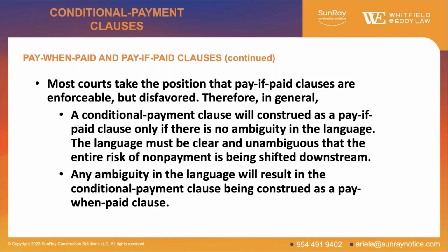It's unclear whether that statute would void a pay if paid clause. There's no Iowa appellate court case on it, but just be aware of that. If you're on a public job in Iowa, there is that open issue here. But most courts, absent some statute that says otherwise, take the position that a pay if paid clause is enforceable, but they're generally disfavored. So what does that mean?